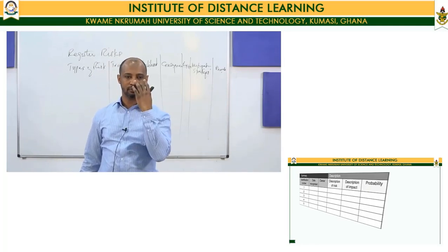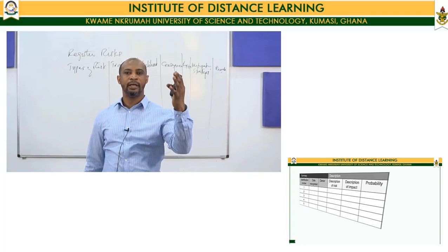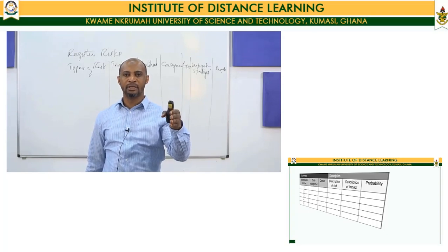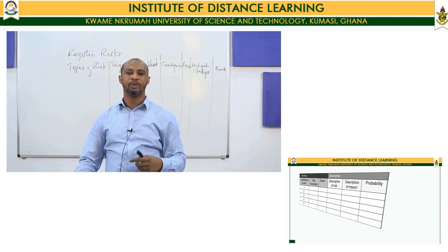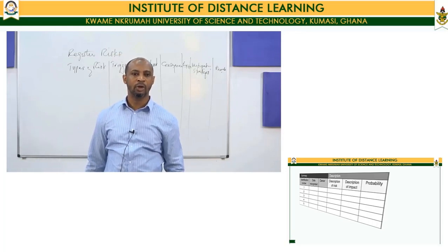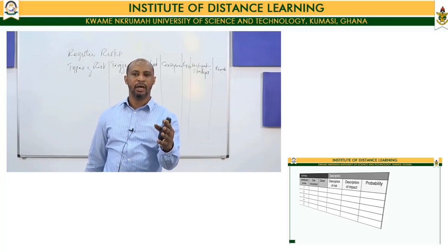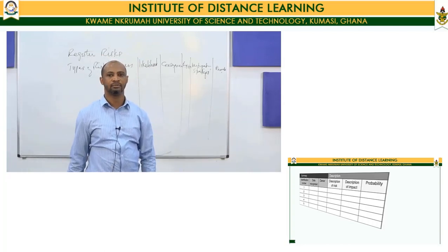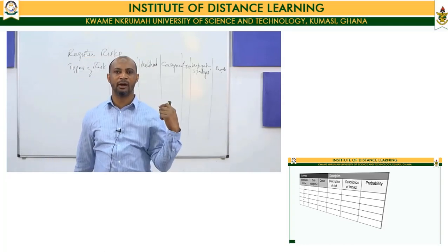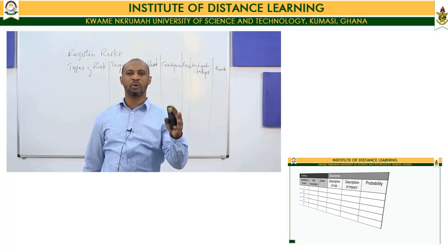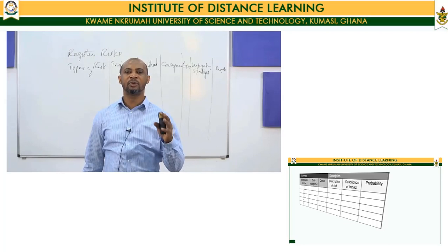So you can have a table like this, where you look at the identification number of the risk, the date it was recognized. You see that these ones will refer to generally risks that have normally even occurred. You can also use this same matrix to be able to develop your risk register. This is a variation of what I have on the board. So you have date recognized. Who is the owner? Who is responsible? You are placing responsibility on somebody's head. What is the description of the risk?